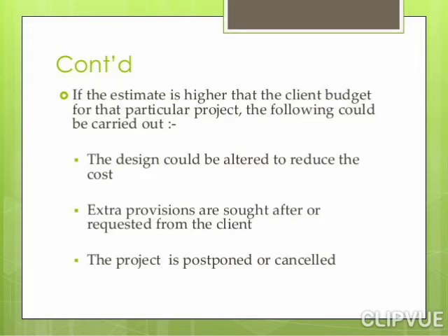If the estimate is higher than the client's budget for that particular project, the following could be carried out. The design could be altered to reduce the cost. Extra provisions are sought or requested from the client. The project is postponed or cancelled.